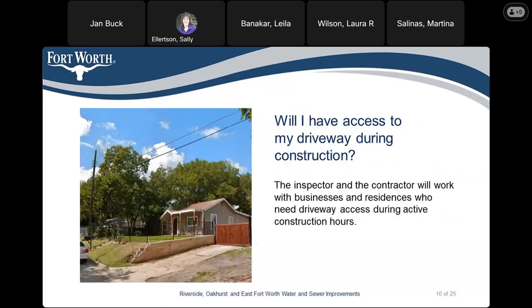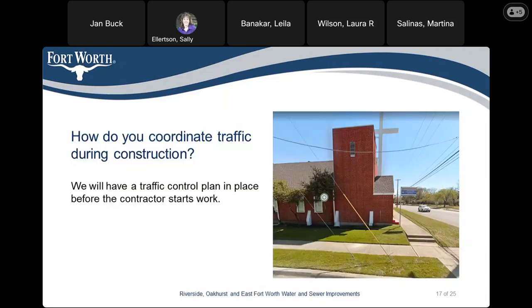Will I have access to my driveway during construction? The inspector and the contractor will work with businesses and residences who need driveway access during active construction hours. We always have traffic control in place before the contractor starts work.